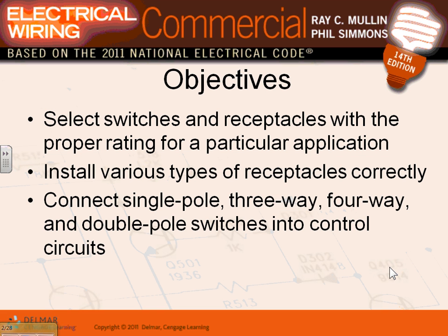They call them commercial grade receptacles, spec receptacles. When you do the takeoff for Chad, when we give you the software, you're going to find two types of receptacles in the takeoff. One says spec receptacle, you're talking about a $2 or $3 receptacle, and the other one is the residential receptacle, 33 cents. I don't have them with me. You've seen these little skinny, cheap ones. So that's the difference between a receptacle you do in a commercial building and a receptacle you do in an industrial building.